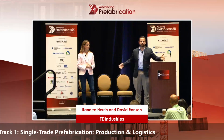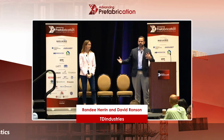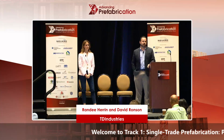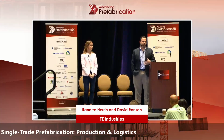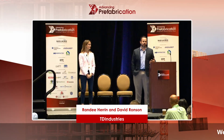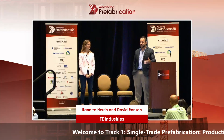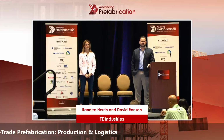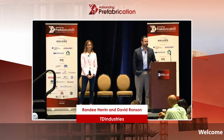A work package is just a group of fittings that the field has asked for. Could be anything connected to this specific VAV box or this particular floor of chill water, what have you. They try to manage the package sizes. So we don't want anything over 2,000 pounds, right? Or we don't want any more than 100 diameter inches in a package. I'm not the shop manager. We'd have to ask the shop managers what those metrics are, but those are the metrics that they would pay attention to as they're creating packages to make sure they're not making ones that are too large.